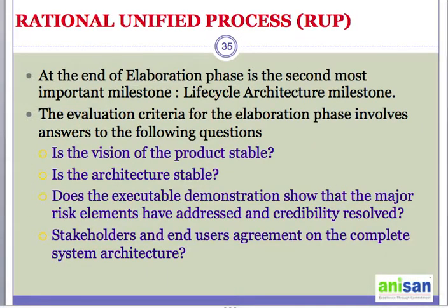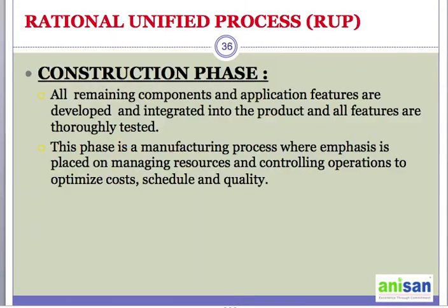This is slide number 35. Okay, so the 36 is this one. So we have completed the inception phase and elaboration phase. If you remember, in the inception phase, the outcomes are a vision document. That's a general vision of the core project's requirement, key features, and the main constraints. Along with the vision document, we also have an initial use case model.